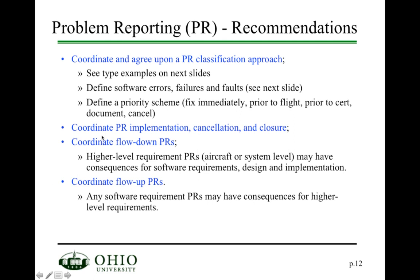You need to coordinate what I call flow-down problem reports. For example, if you have a higher-level requirement problem report at the system level, it may have consequences for software requirements, design, and implementation. The problem report on those system requirements may flow down to a problem report on the software requirements. Similarly, flow-up problem reports mean software requirement problems may have consequences for higher-level system requirements. You need to come up with some coordination strategy.